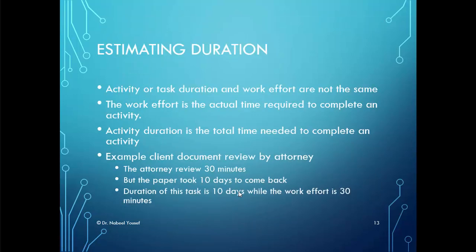To estimate task duration correctly we need to understand the difference between work effort and task duration. Work effort is the actual time required to complete an activity, while activity duration is the total time needed to complete an activity. For example, an attorney's actual review time for a client document was 30 minutes, but the paper took 10 days to come back from the attorney's office. So the total duration of this task is 10 days, while the work effort is 30 minutes.